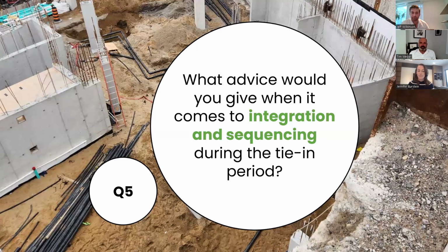And, Jennifer, you mentioned that concrete being poured on our lateral tie-ins. Well, we dealt with it and we sorted it out. It wasn't a big deal, but that changed our process. Now, when we pressure test, when we're doing our lateral tie-ins between pour breaks, before we move to the next pour break, we don't leave that until it's pressure tested, gravel's on top, it's protected. Because what happened there is we left it unprotected, it got damaged, nobody said anything, and we had to deal with it after the building was up, which is doable, but less than ideal.